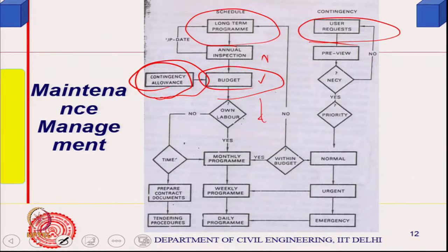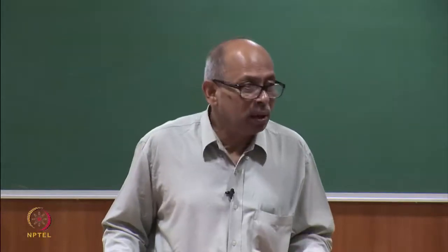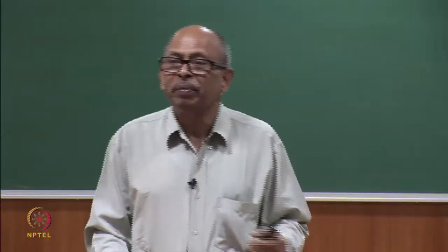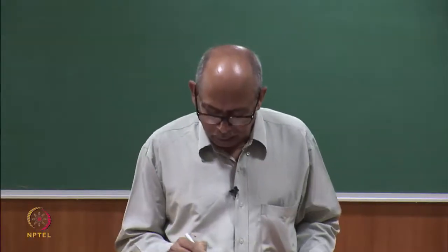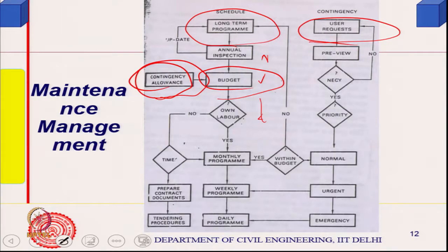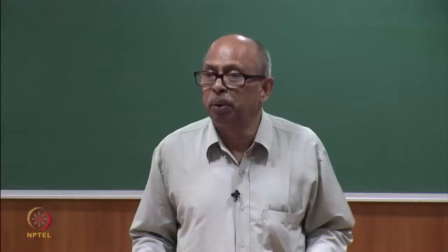Then you have to decide, if I am doing the budgeting this year, whether I will be doing it on my own, or I have time and I will put it to the contractor or outsource the whole thing. So, if it is own labor, then of course it will be put into a monthly and weekly program or daily program, depending of course on their priority. But if it is normal, obviously I will put it in monthly.